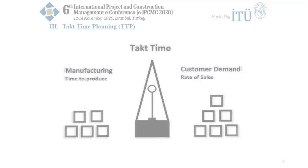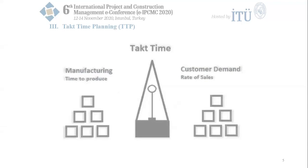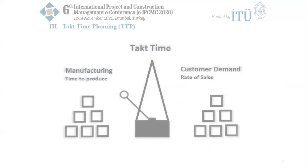In both cases, the project team encounters waste and concurrency collapses. Therefore, at field work, trades underload their production units — for example, 70% or 80% of capacity — after evaluating work density. People who finish work earlier than takt time can work on off-takt tasks, prepare for the next takt sequence, or improve their work. The takt time eventually enhances supply and demand rates to become matched with a steady flow where each zone's trades identify the scope, means, and crew loading of work.